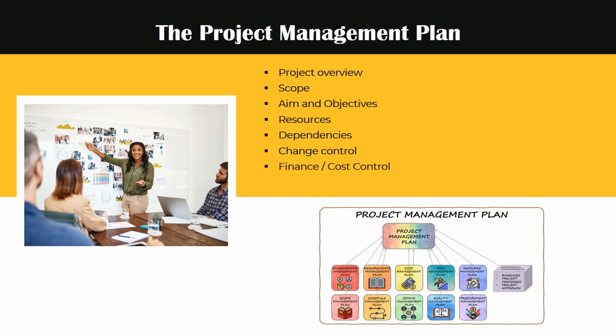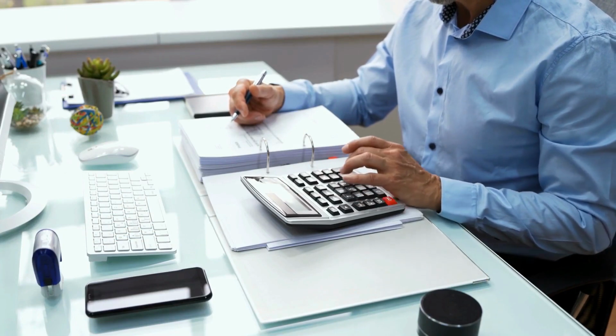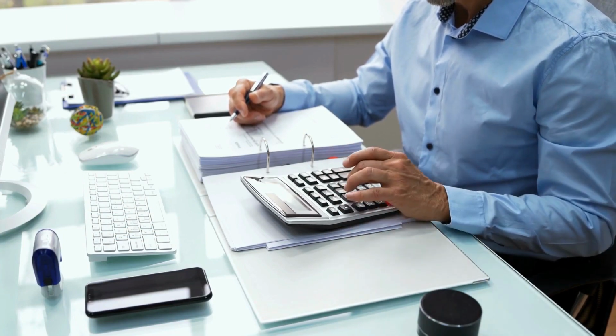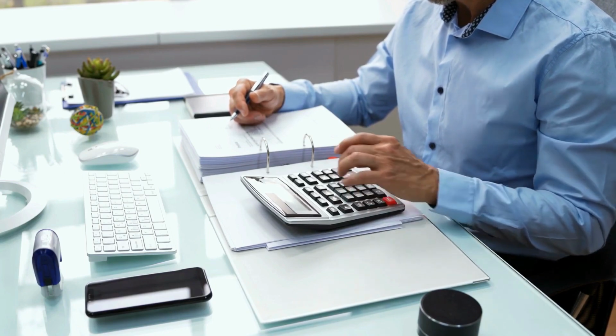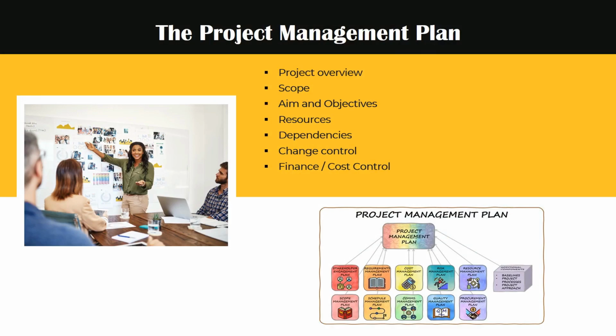Finance. This is the budget information of the project. The overall budget, where budget is allocated to. For example, £200,000 for hardware, £80,000 for engineering resource, and £50,000 for software. Schedule baseline. This is a stake in the ground plan that details the work breakdown structure of the plan, activities, durations, and owners. Various tools can be utilized to pull together a project plan.